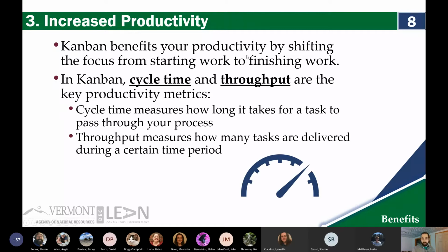One of the important things, and this happens a lot with projects in state government, is that we're really good at starting projects and we have a lot of trouble finishing them. Kanban helps get us focused on finishing that work, because if you say, we're here on the second stage of this process and we can only have 4 tasks in this step, then we have to move it. We have to move one out before we can move another one on. So we're not starting a dozen projects and finishing one or two. We're starting one, we're finishing one.